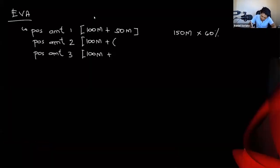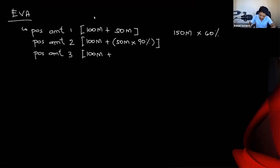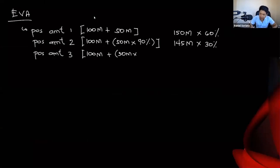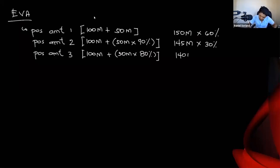Possible amount two: if completed one week late, the performance bonus decreases by 10%, leaving 90% of 50 million, which is 45 million. So the second possible amount is 145 million, with a 30% probability. Possible amount three: if completed two weeks late, two 10% deductions apply, leaving 80% of 50 million, which is 40 million, giving a third possible amount of 140 million, with a 10% probability.